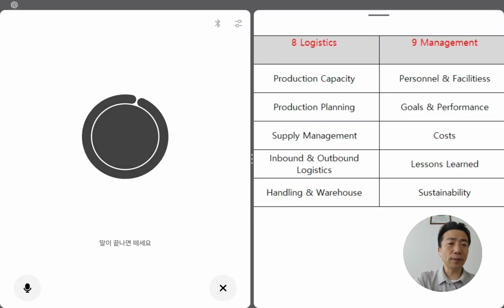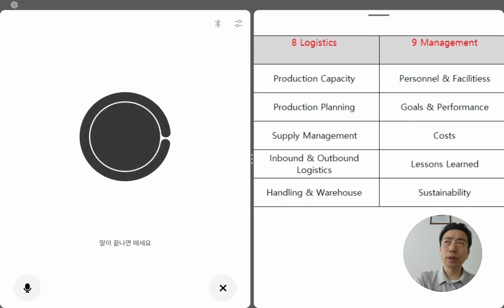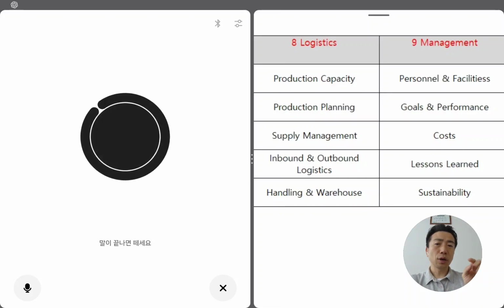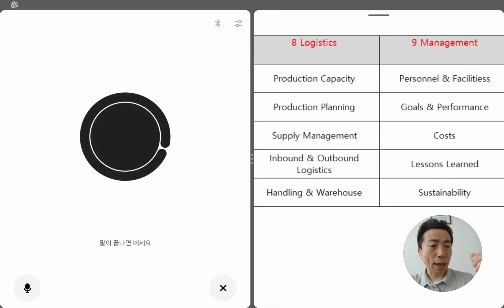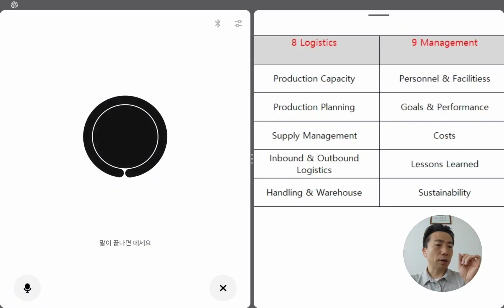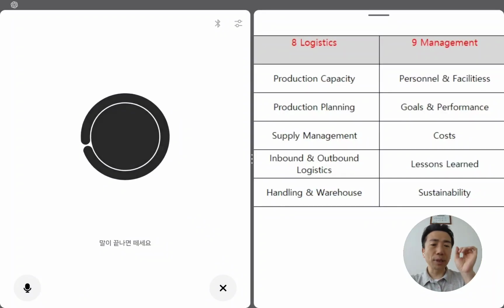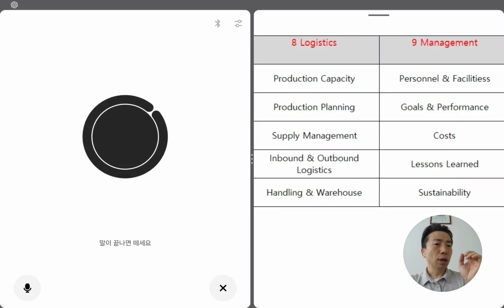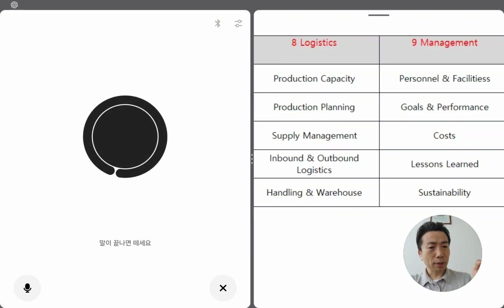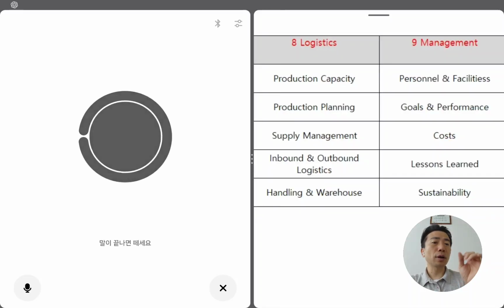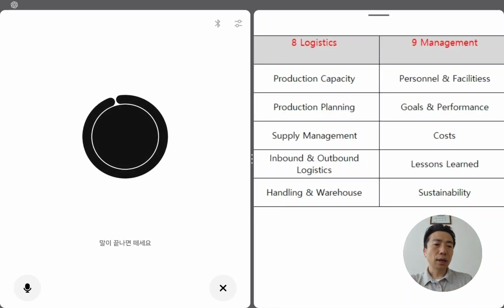a specific Excel file to collect every issue. Before we choose some issue as the lesson learned issue, we have to collect every issue first, and then some group, some kind of task force, has to choose and pick up the lesson learned issue from the every-issue list.